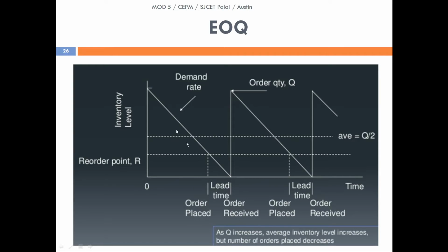As the time increases, the material gets used up for the process, and as a result, our stock or inventory reduces. The inventory goes on reducing, and at this point, this is half of the total quantity of inventory we had at the initial phase. So we have reached the half space, and then we could see a particular point known as the reorder point. When the inventory keeps on decreasing from the initial large point towards the 0 point here, we will place the next order, which is also known as the reorder point or the order point.